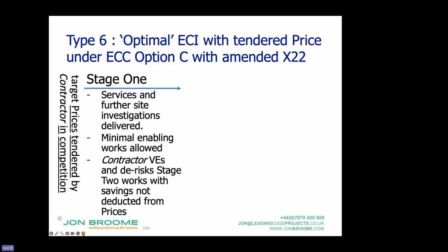So it really gives the contractor and the client working with them a really good opportunity and the incentive to take out costs. If compensation events happen in stage 1, then they can be compensation events, so the price can go up. So you go, hang on, this is all upside for the contractor. Compensation events generally push it up, but all savings, they get a share of.